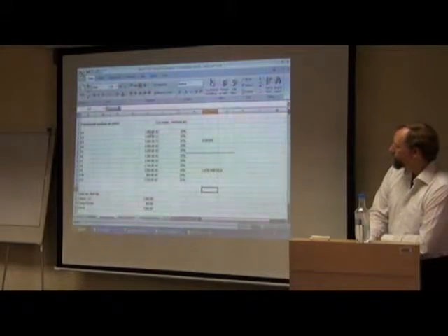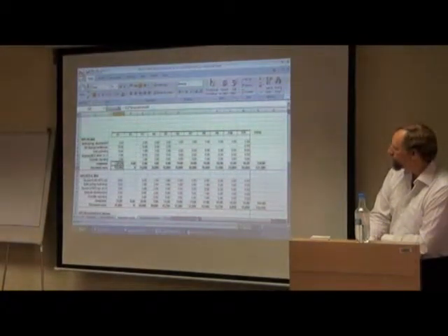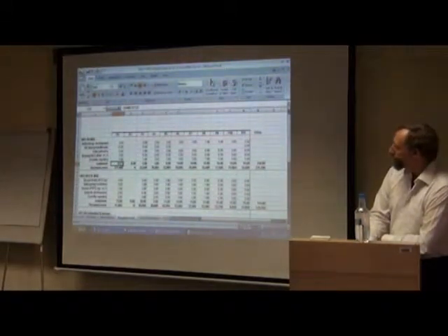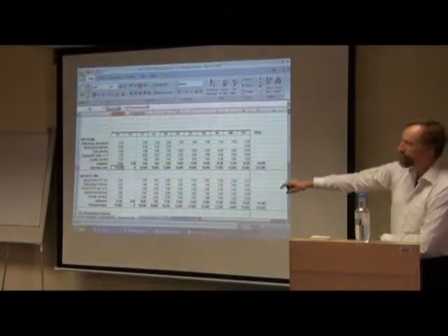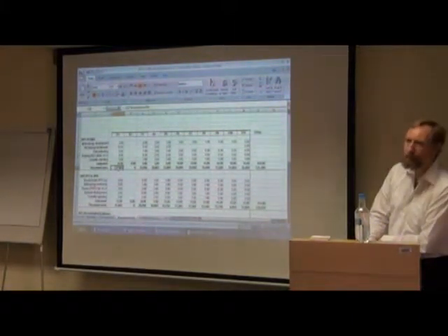Now this average is then used here. You convert here, for example, these 32, sorry, where is it? Here, 32, that is the sum of the person months for this work package, is then multiplied by the actual salary cost per month coming from the assumption sheet. And that gives you the euros for the 32 person months for that partner in this work package.